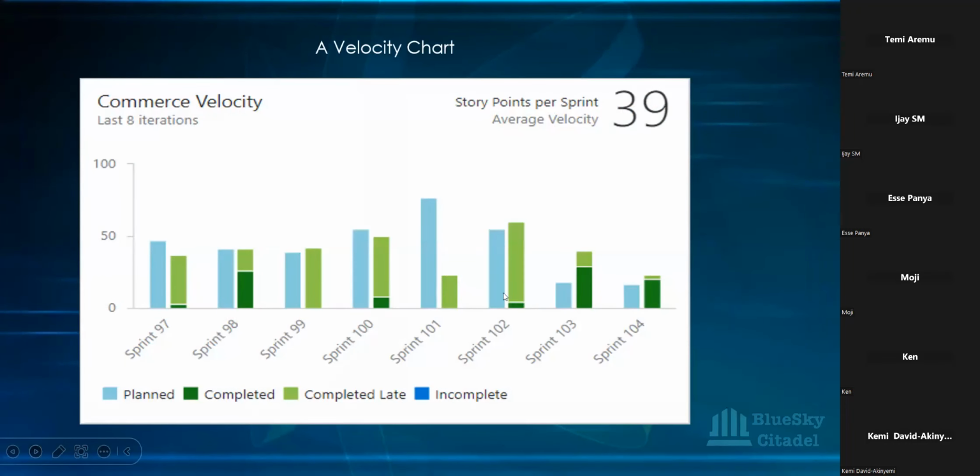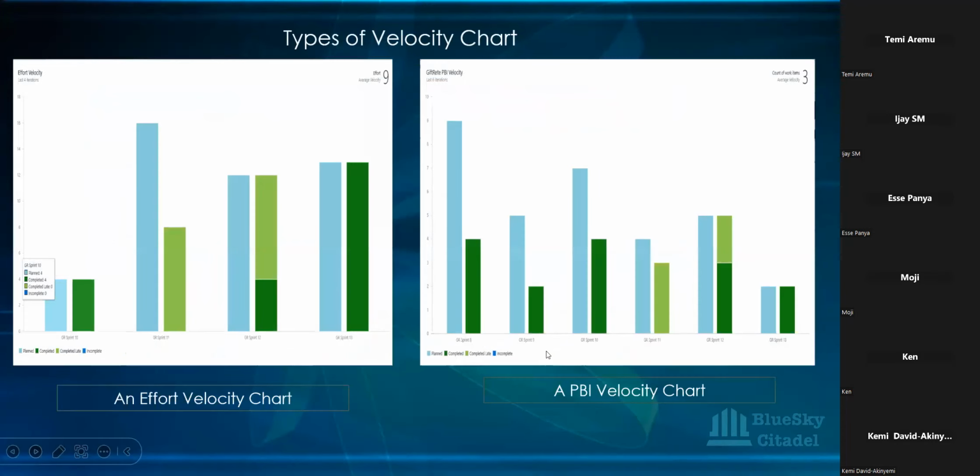Let's assume that in this particular sprint, let's see what it is properly, in this particular sprint, when we have this green, there is another bit at the top that is blue, and we've gone some couple of sprints after that. What that is telling me, if I see a blue here, is that you've left some work in this sprint undone.